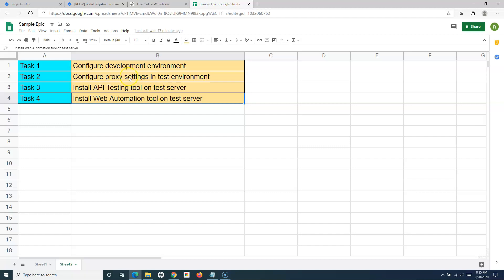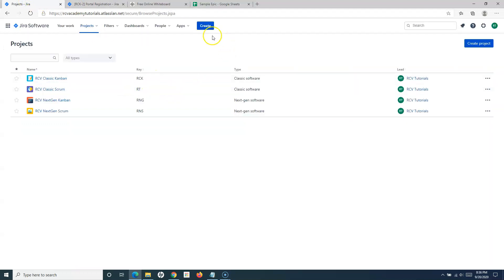This allows you to segregate the actual piece of work that brings value to the end user — which is a user story — from the task, which is an enabler or piece of work that needs to be done but doesn't directly add value to the working software. Any piece of work not directly required to build that particular user story can be categorized as a task and created separately in Jira.